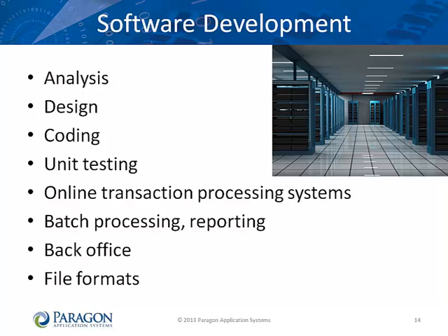Analyze your current online transaction processing software. Make sure it supports EMV. You may need to migrate your software to a later version that supports EMV. Don't forget to look at batch reporting and back office systems. Do you exchange files with upstream or downstream connectors? Do those file formats need to change to include EMV data? Who will you need to test with? Who will you be certifying your changes with?